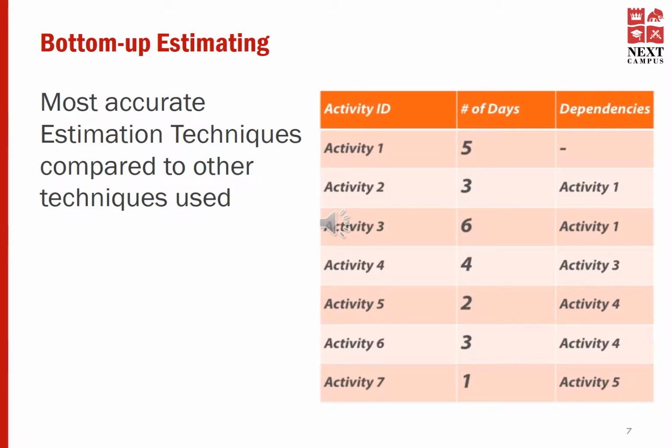The work package is like a contract between you and the team member for their task. You need this contract to make the bottom-up estimating process work effectively with as little padding of the estimates as possible. Team members pad their estimates because they are concerned about the scope of their work expanding after they have started, without any adjustment to the estimates. They foresee finishing late on the expanded scope and being blamed for missing their commitment. A similar result can happen when external events affect their ability to take the task to the done state within the estimated time frame.